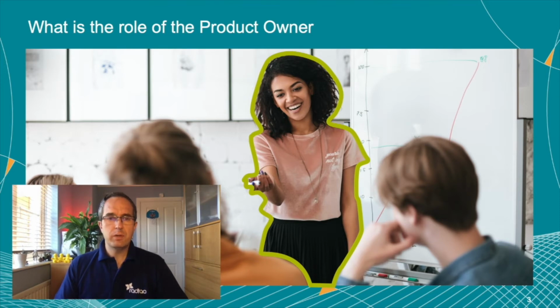Just like any PO for any other Agile team, they are responsible for the story definition, working with the team members during their planning so the team can effectively estimate and sequence the work, accepting the work when complete, and they collaborate with the POs and PMs within the ARTs. Like all POs, not only do they serve the team, but they serve the program too.